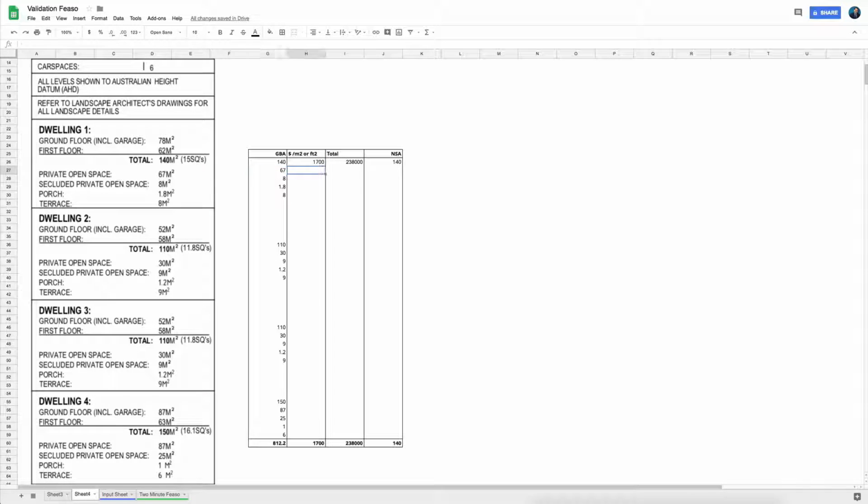And now, because I have a construction company as well, where I've actually analyzed my past data, I know the details of what they come out to be for private open space. For example, I would allow about $1,000 there, because your covered area, where your actual livable area is going to be, is different in terms of cost, and where you have private open space or porch, there would be a different rate.